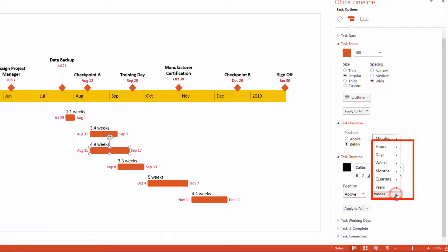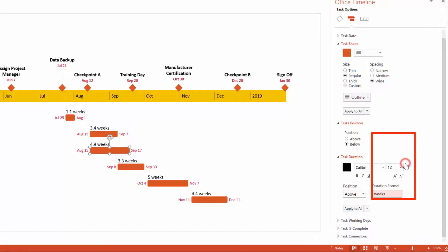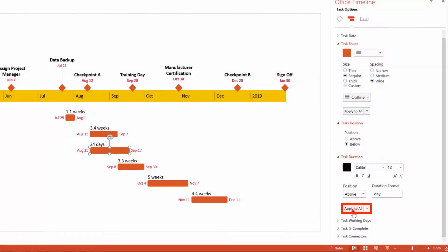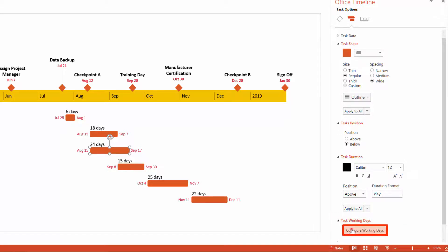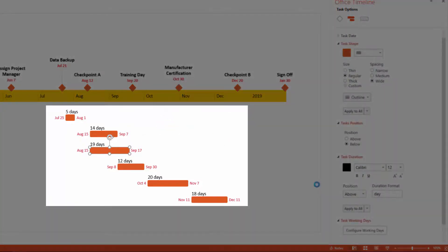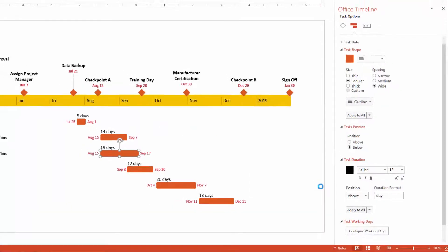The second option you have is your date format, which allows you to format your task durations in minutes, hours, days, etc. Because this project is being calculated in days, I'm going to select the Days formatting style, which applies that formatting to my selected task. To apply it to all other tasks, I'll click Apply to All, and all of those task durations are automatically updated. One other option here is Task Working Days: you can specify which days of the week should be calculated as part of your task durations. Because this project runs Monday through Thursday, I'll unselect Friday and click OK, and the add-in automatically recalculates all task durations in your graphic.